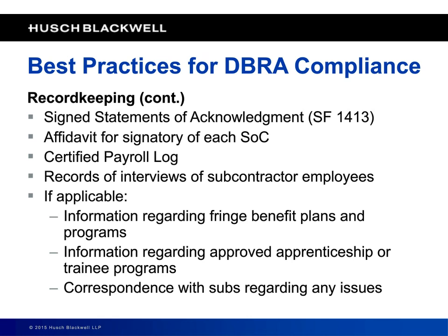Keep that log. We talked about a best practice being interviewing subcontractor and particularly lower tier subcontractor employees to make sure that they're aware that it's a Davis-Bacon Act job and that they are actually being paid on a weekly basis in accordance with the scale for the job. Do those interviews, and most importantly, document that you do them. Because again, the Department of Labor is going to do them itself, and you go a long way towards making them comfortable with your compliance if you can show that you've done that yourself.